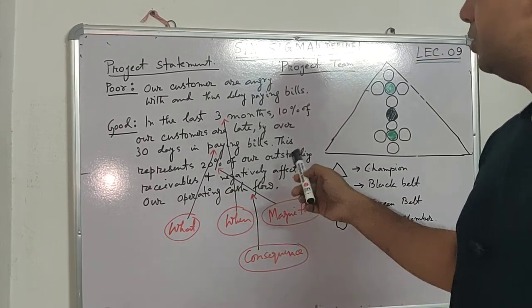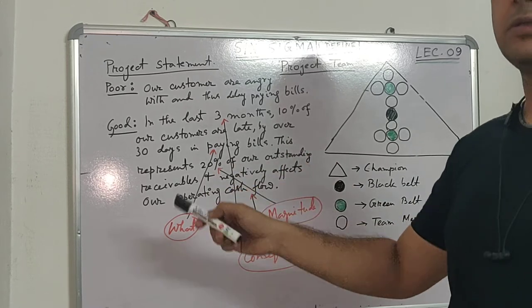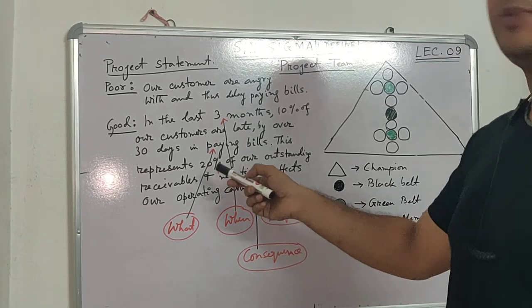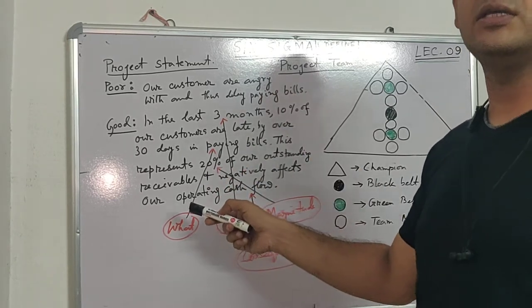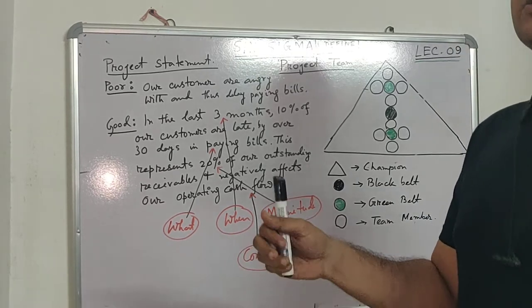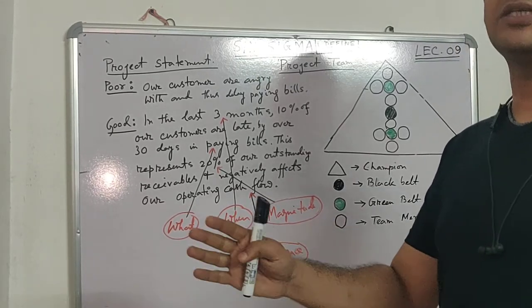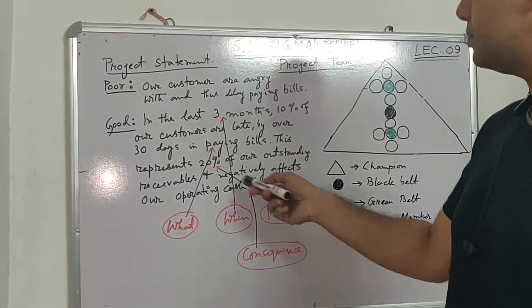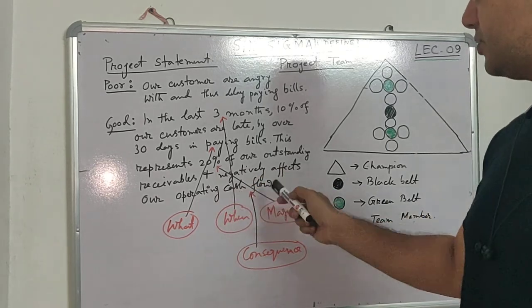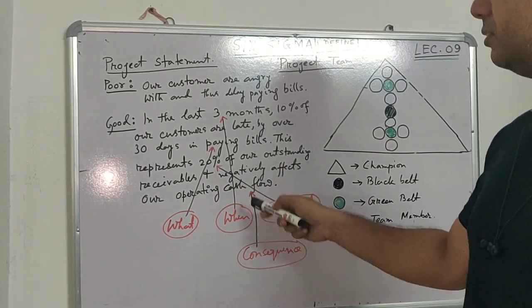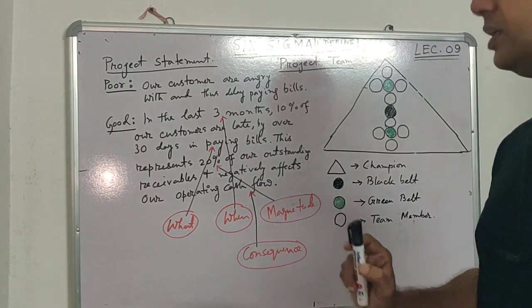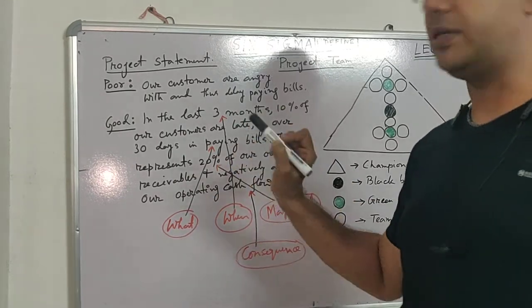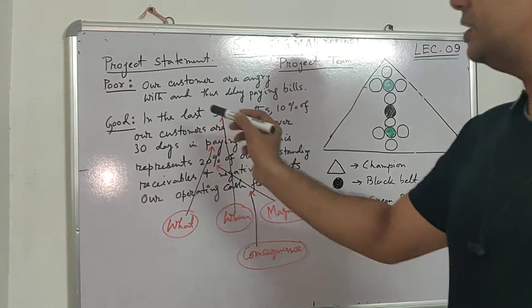The magnitude is 20% of outstanding receivables, which is huge, making this a serious problem and a strong candidate for a Six Sigma project. If anything affects beyond 10% of our business it is very much ready for a Six Sigma project. The consequence — not receiving money affecting operating cash flow — is also clearly stated. When, what, magnitude, and consequences must all be mentioned in the statement.